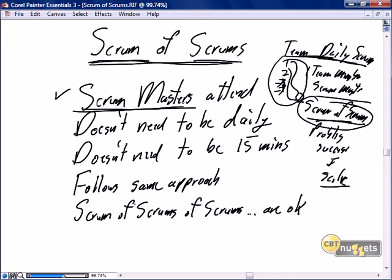But we will typically develop our Scrum of Scrums. The Scrum Masters are the people who attend the cross-pollination, and the product owner, although always encouraged, is not critical. The details will be discussed in the daily scrums. The Scrum of Scrums is more for the cross-pollination and cross-information sharing. So therefore, I would love if my product owner had the time to come to my Scrum of Scrums as well, but it's not critical that the product owner participates.